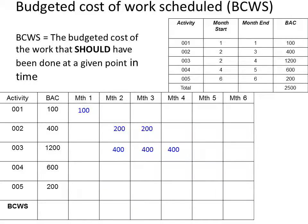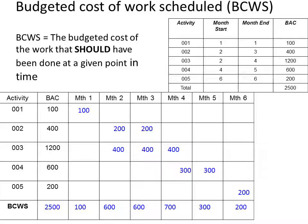Activity four has a lifespan of two months with a total budget allocation of $600,000, loaded accordingly in the table. Activity five has a duration of one month with total spending of $200,000. We have now completed the budgeted cost of work schedule table based on the initial cost plan. In the last row, we calculate the cumulative value by adding all values in each column. For example, month one shows $100,000 and month two shows $600,000 cumulative.